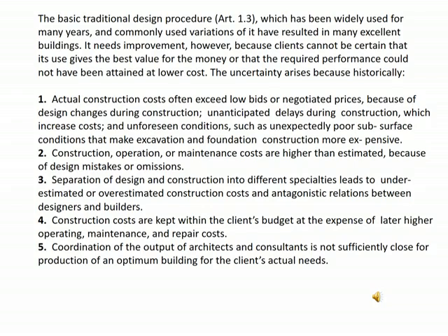So all of this is designed for one building. Then with unforeseen circumstances, such as something unexpected in the foundation, or delays that can happen, or poor excavation of the foundation and subsoil conditions, those things happen and in this case the building design needs to be changed. So in this case additional cost will occur. So this is the actual construction cost.